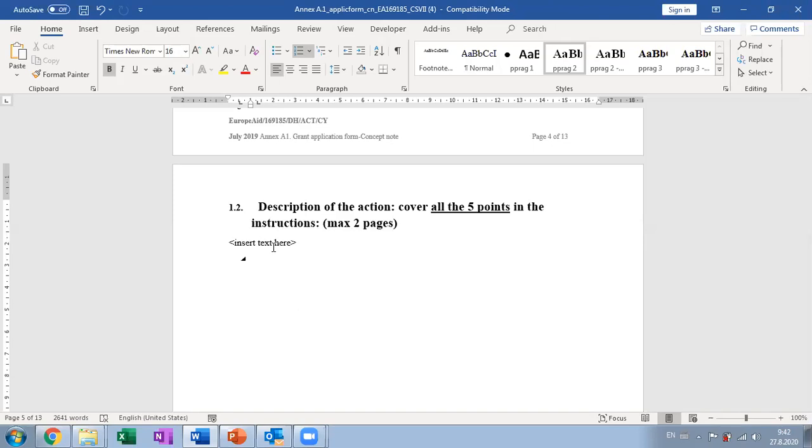Because very often it happens that plans do not actually work. You're thinking, okay, we may start in June, and then this and this will happen in July, but then the donor actually needs a little bit more time to assess your project, and then they don't start in July but in September, and the entire action plan falls under the bridge, so to speak, because you have to change it fully. So don't mention calendar months, and don't plan thinking that for certain in this calendar month you will undertake this and that activity.